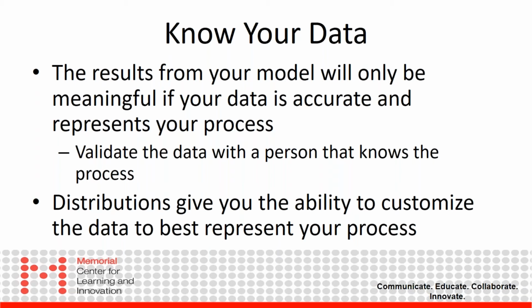One of the prime examples that we have used in the past is we have built a model looking at our emergency department and the throughput of patients moving through. One of the data points we were looking at was our door-to-doc time, or how long it takes for a patient to come in through the door before they are being seen by a physician. Well, we had pulled data, and we realized that there are a lot of different definitions, depending on the person's background, of what door and what doc time was in this process.